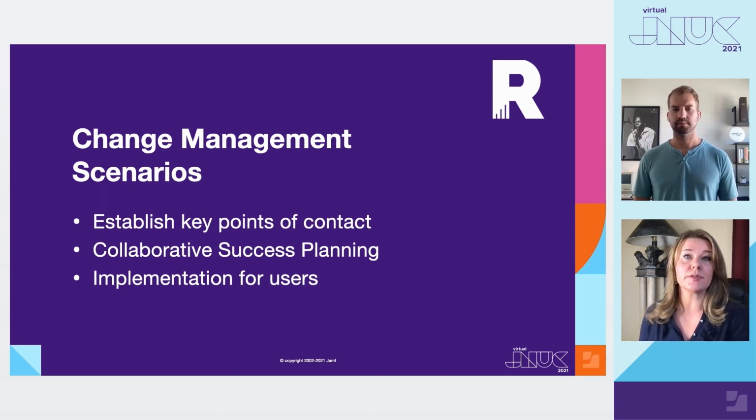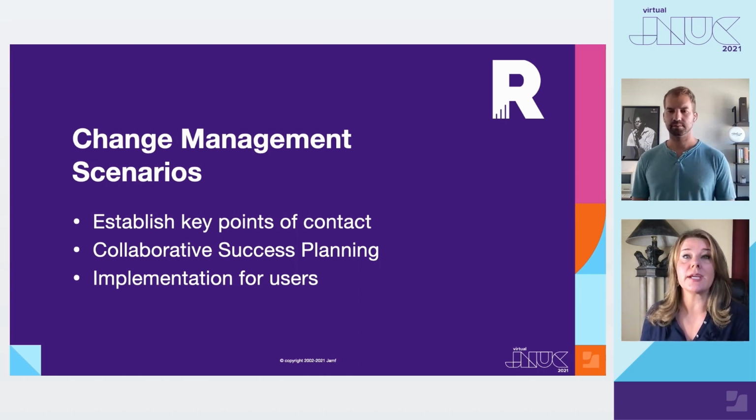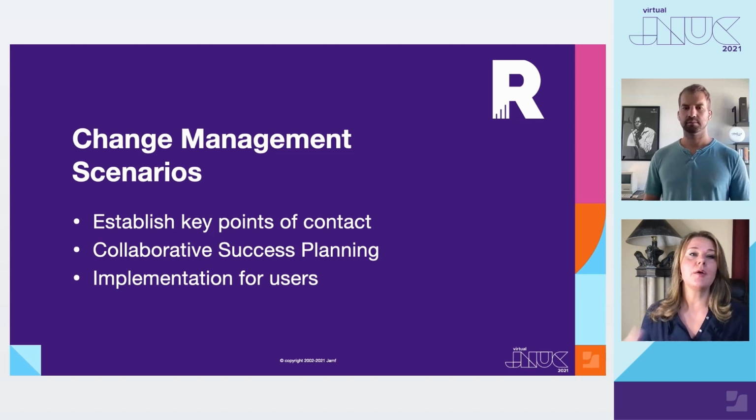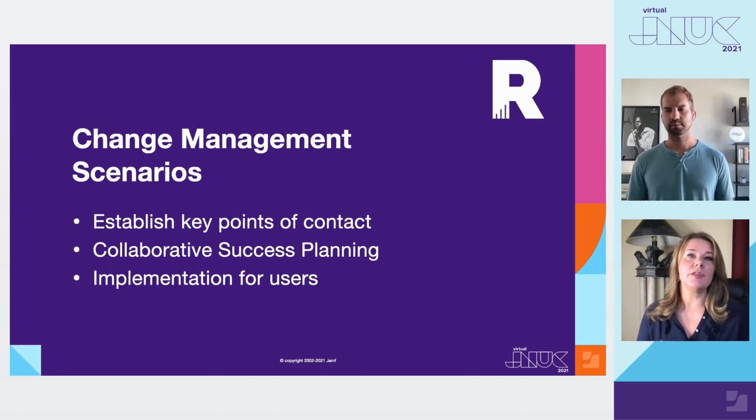Then I went over to the end users and I said, look, let's get together. I understand your frustration. I'm hearing the concern and the need. How can we fix it? Are you willing to come back and explore a potential solution here and do some testing for us? And then, of course, to the stakeholders, saying, you know what, I think we can find a solution here. Bring them all together in a meeting, start as a neutral party, explain this is the standard and this is why it's the standard, this is what it's doing for our end users, it's not working. How do we find a middle ground? And you can raise some potential ideas that have already been developed or started in those smaller conversations.